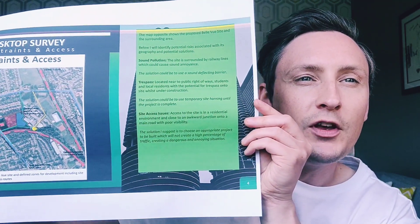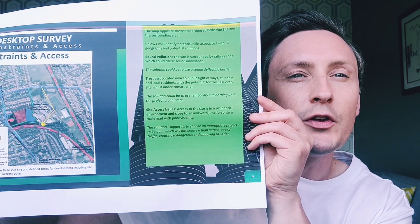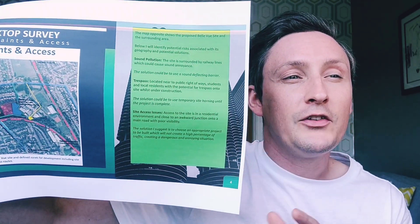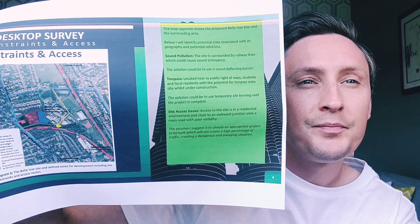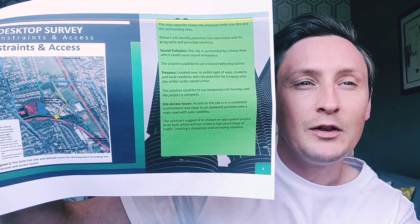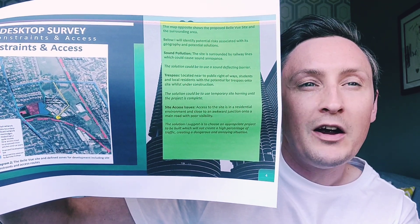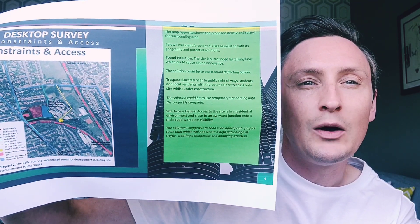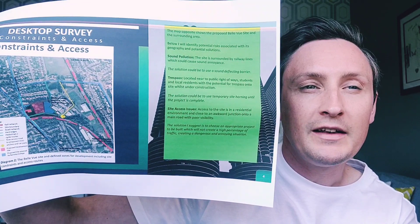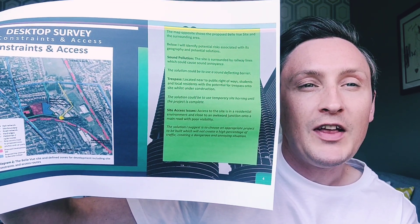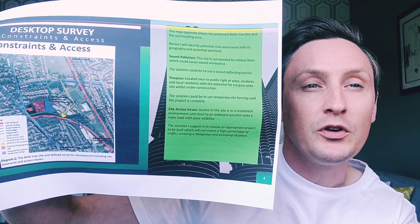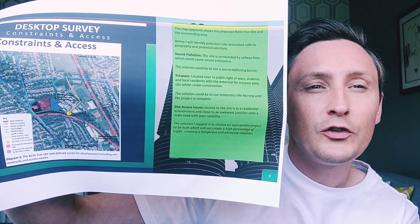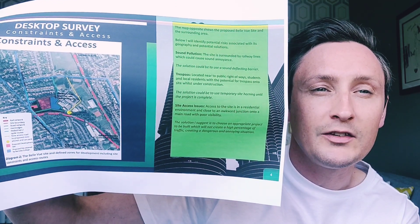I undertook a desktop survey. This map here shows the purpose of the Bellevue site and the surrounding areas, as well as the associated risks highlighted on the map. Some of the risks I identified were sound pollution — the site is surrounded by railway lines which could cause sound annoyance, so the proposed solution would be to use a sound deflecting barrier. Another issue I identified was trespassing; the site is located near public rights of way, with students and local residents having the potential to trespass onto the site whilst under construction. The solution I propose would be to use temporary site hoarding until the project is complete.